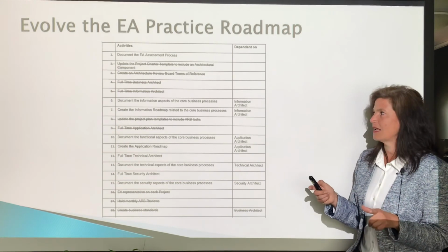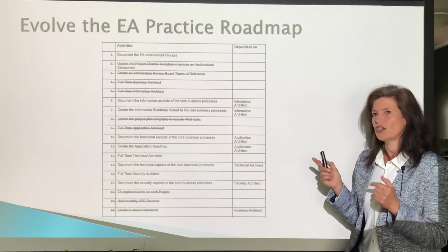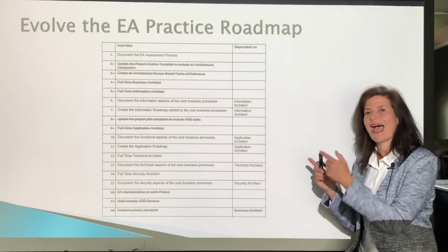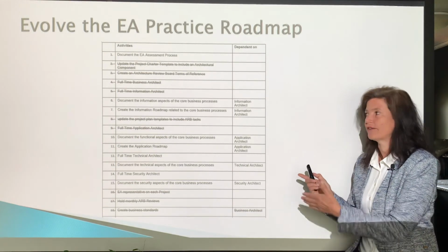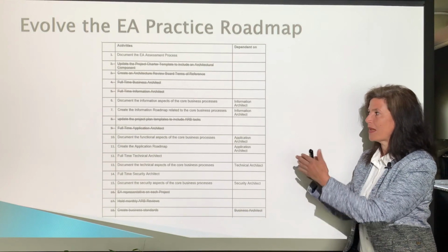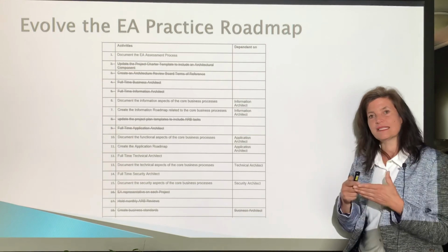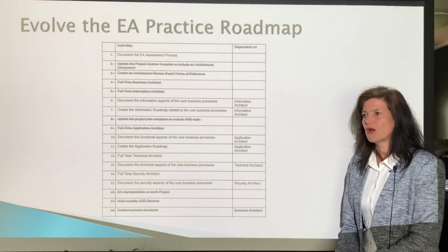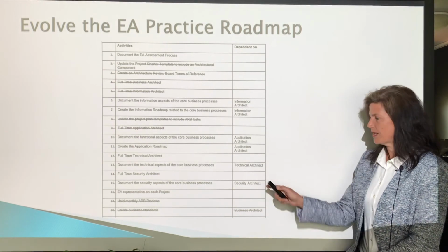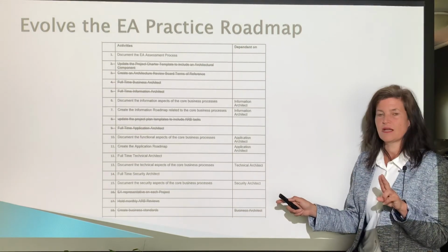Another interesting thing that you will note is once you start implementing things, you might be adding other activities that are coming up or that you're thinking of, and you might be putting new ones on here. You might be breaking them apart because they stay quite high level, but as they come current, you want to start breaking them out. What I've done is I've put a copy of this, 2 copies in each section.